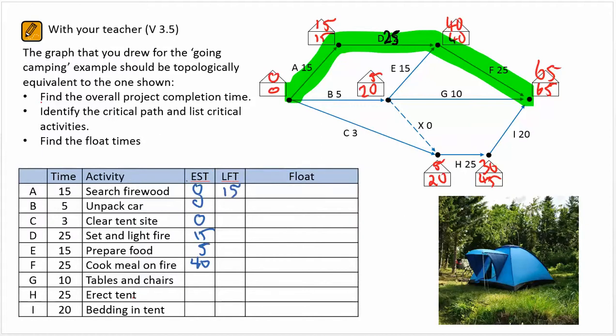So you'll notice the earliest start times I've listed here are from the top of the timekeeping boxes. So just completing that, obviously A, B and C will start or can start concurrently. With D is reliant on A being completed, so we have that 15-minute start. And quickly just listing them for G, H and I.